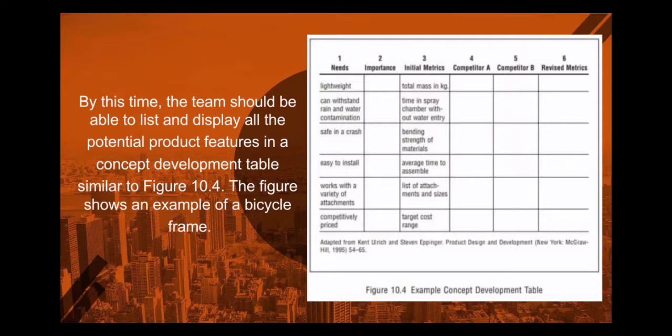Since this point represents a milestone in the new product development process, there should be a sign-off of the initial review committee to indicate their acceptance of the metrics, in effect freezing the benefit set. Although actual product specifications won't be frozen until after prototype development.